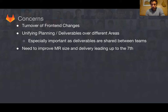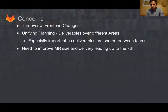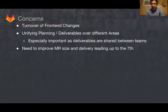The other big thing we saw, especially with the last release, was that we need to improve the merge request size and delivery. What happened is it's like a big harbor and on the 7th all the big ships are coming in. So we want to make this in smaller chunks that are way better digestible over reviews, and also over testing and merges between CE and EE.